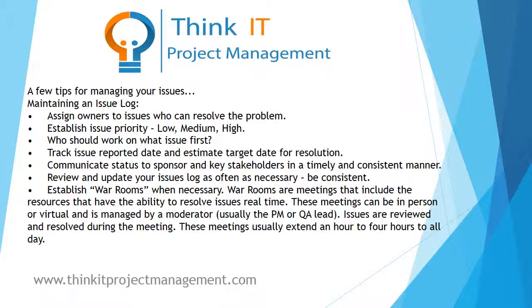You want to have resources, again, as I mentioned, who can resolve the problem, but you also want to make sure that they have enough allocation assigned to deal with these problems. Because it doesn't do us any good if you have someone who is assigned to the project who can solve all of your problems, but they're only allocated, let's say, at 5%, and you really need them to be dedicated at 25% allocation to your project. So if they're not properly allocated, they're not going to be in a position to help the team.